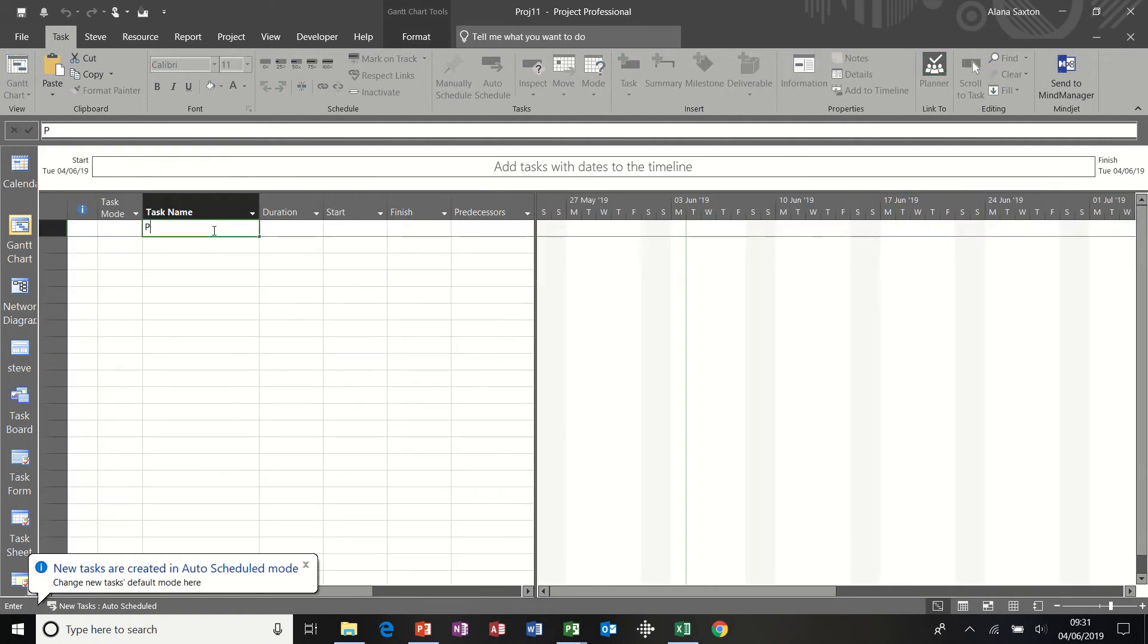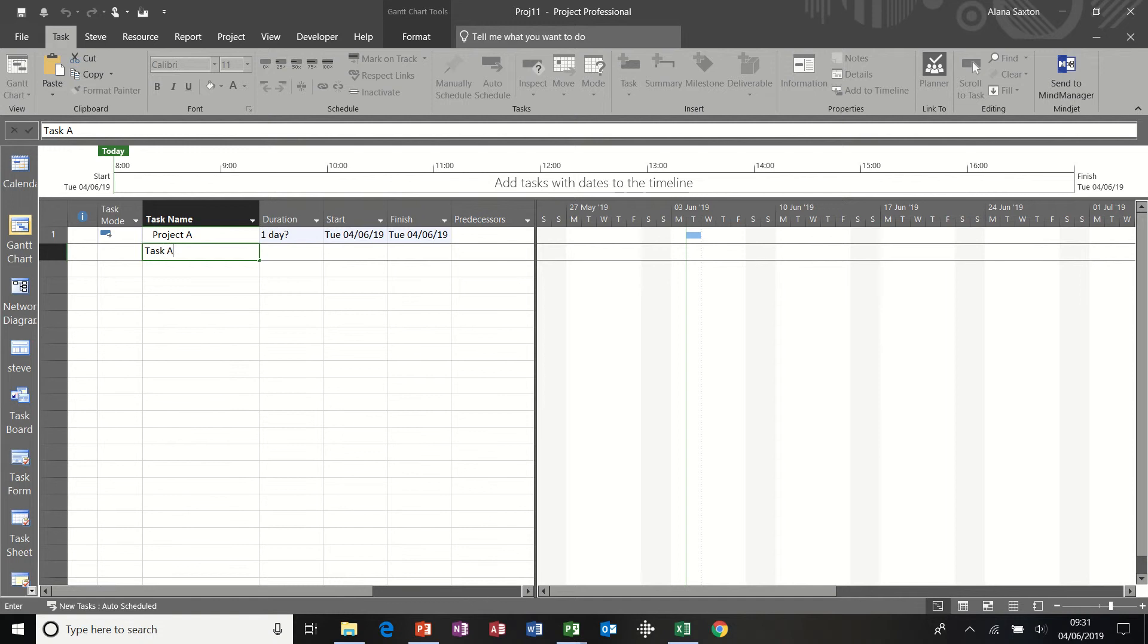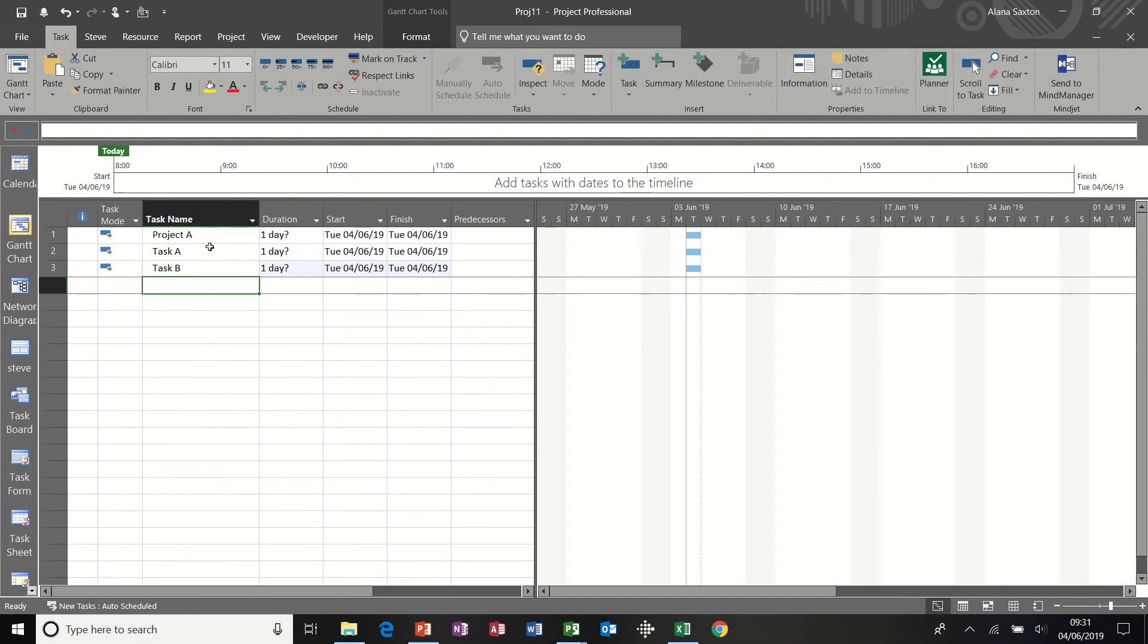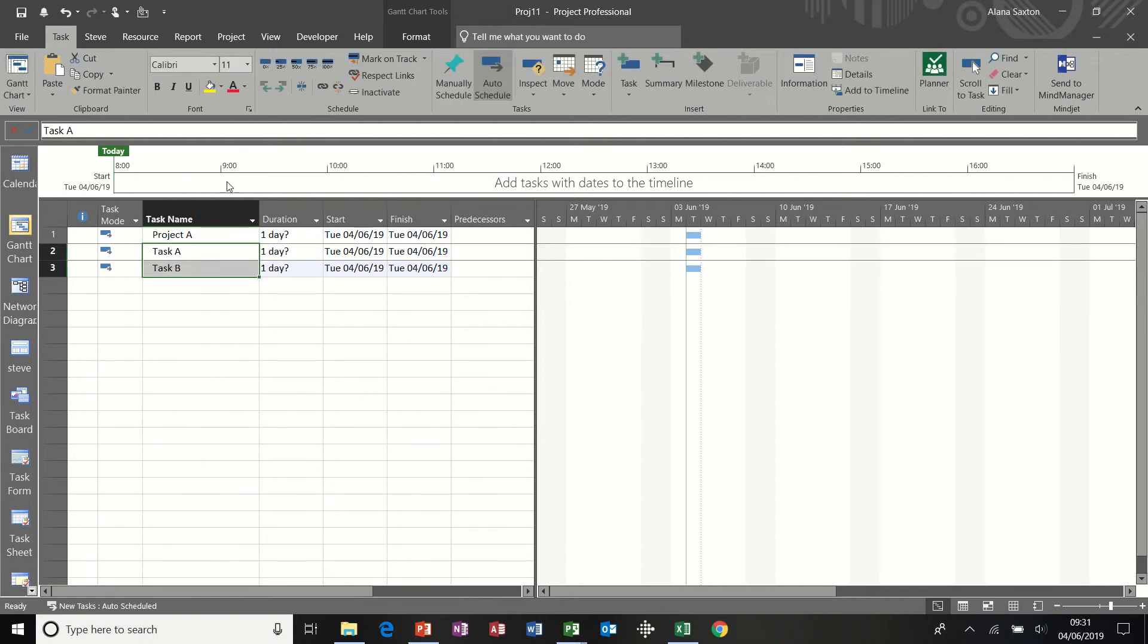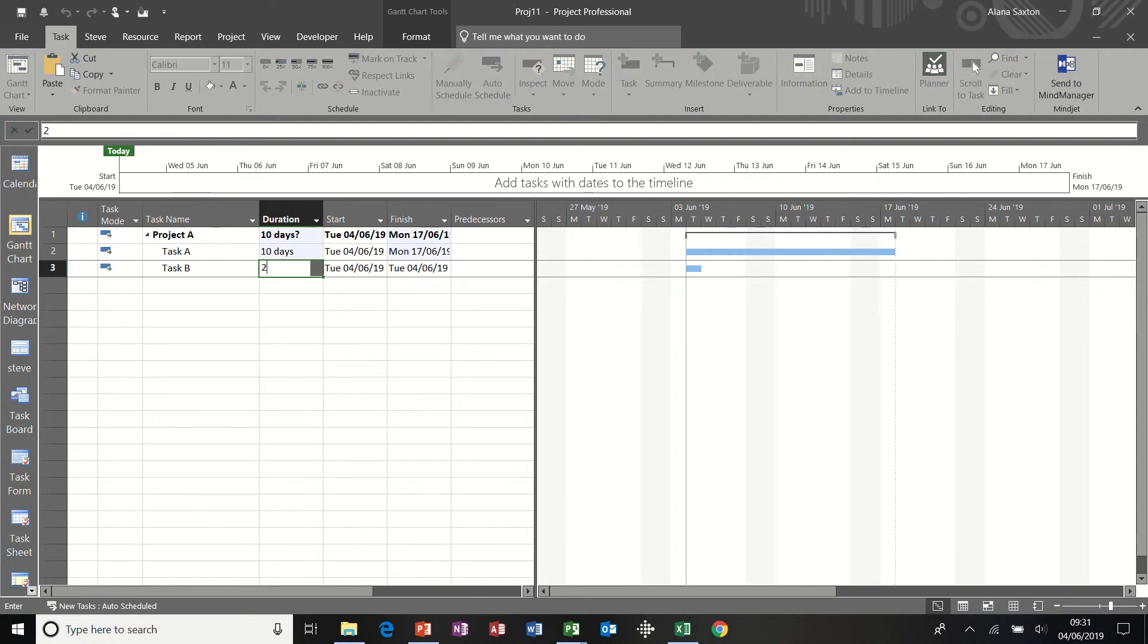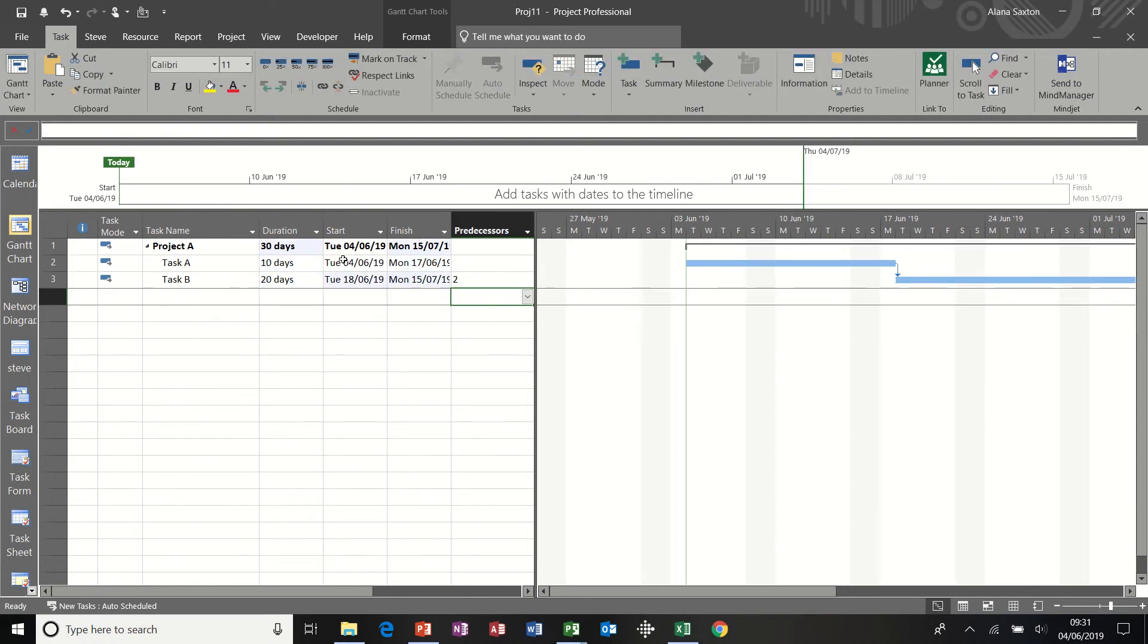So Project A will have two tasks. Task A and Task B. Both of those are going to be indented. And I'll give it 10 and 20 duration. Get one to follow the other one. So this project is 30 days. That is the automatically scheduled task. So that is going to pick up the durations underneath. The summary of the durations underneath.